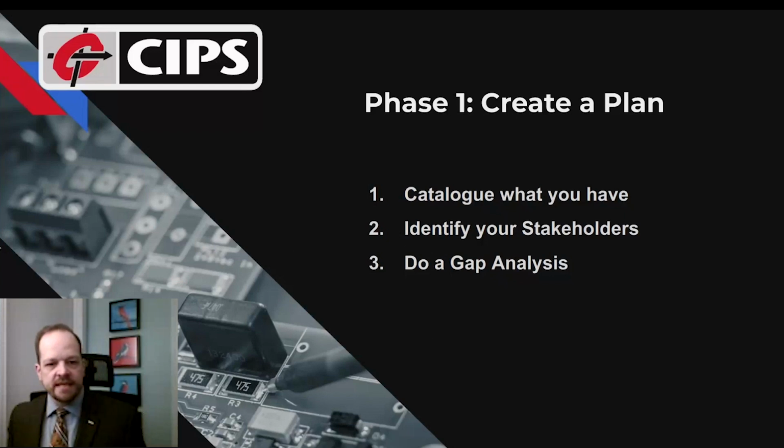From those business use cases, I'll then do what's called a gap analysis. In the gap analysis, the big thing that I want to see, again using the TOGAF methodology, is where you have a goal state and you have your current state. How big of a chasm do we have here? What is the difference between where we are right now and where we want to be? And how painful is it going to be to get there from here?